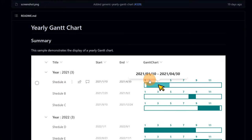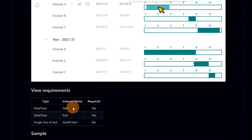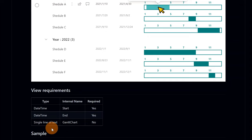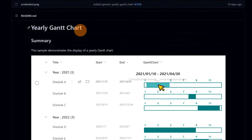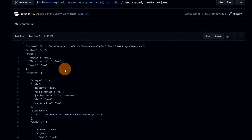There are some requirements that we have to follow. The first one is that we have to create columns 'Start' and 'End' as date and time. Then we have to create an additional column — called 'Gantt chart' for example — and this should be a single line of text. Once you have done that, you are ready to go with this sample. Clicking on the JSON file, we can see the exact JSON we need.